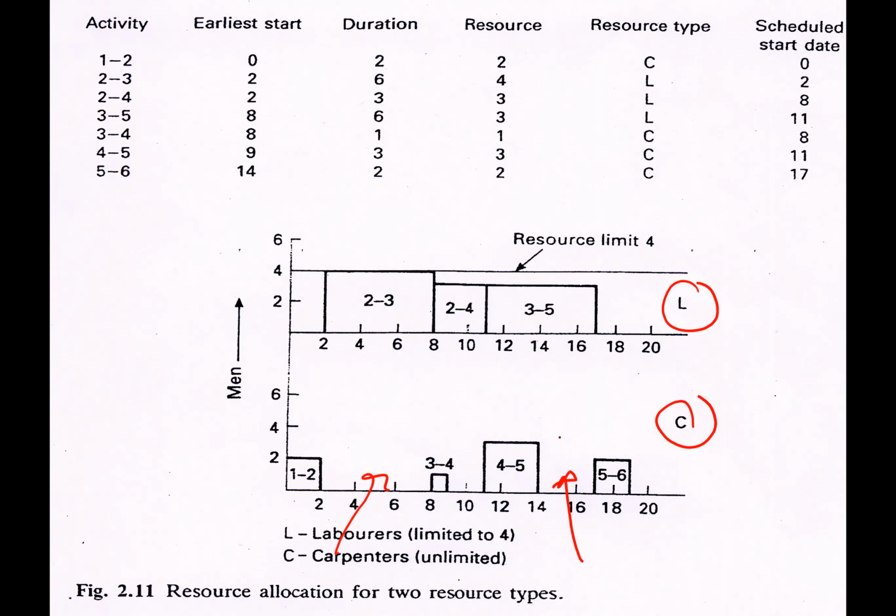If that situation happens, then perhaps resource leveling is much easier, because a carpenter can work when there is no activity required. They can utilize that period. Okay, you don't have to extend the work with regard to carpenter. Okay, all right, that would be an example of resource